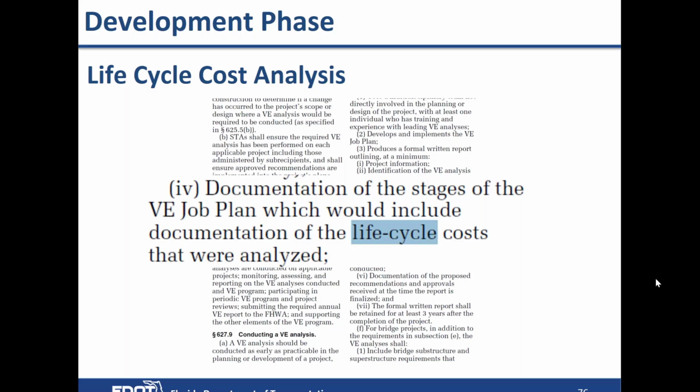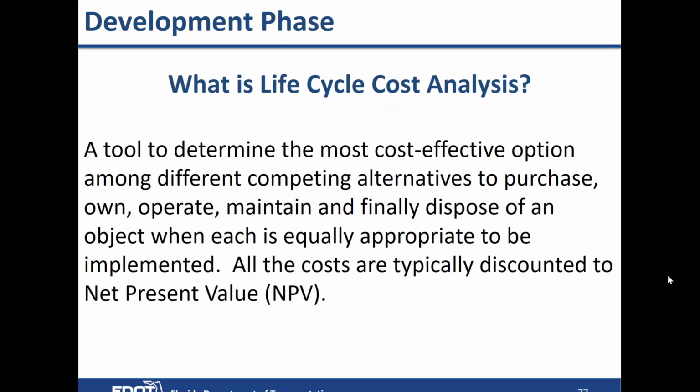Life cycle cost analysis is performed, and the life cycle costs are considered. So what is a life cycle cost analysis? Well, it's a tool to determine the most cost-effective option among different competing alternatives. And that includes all the costs: the purchase, to own it, to operate it, maintain it, and even any kind of salvage costs when it's disposed.